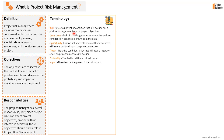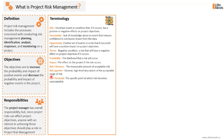Any identified risk in the project should have a probability and an impact. Risk tolerance is the measurable amount of acceptable risk, usually set by the organization for the project manager. Risk appetite is a more high-level, general description of the acceptable range of risk. The risk threshold is the specific point at which risk becomes unacceptable. These three terms — risk tolerance, risk appetite, and risk threshold — are set by the organization. The most specific is the risk threshold; for example, the organization cannot accept any risk with an impact of more than $50,000 US dollars loss.